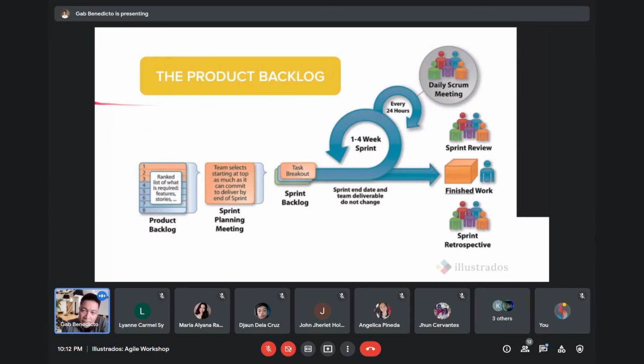So, later, describe natin, and since dun sa activity natin, I'll describe the product backlog. The sprint planning, we will be doing the sprint planning after this. Sprint, as mentioned, consists of 1 to 4 weeks. So, for this one, in Illus, we practice 2-week sprints. Okay? So, pag sinabi namin it will take 2 sprints, it will take 1 month. Please take note of that.